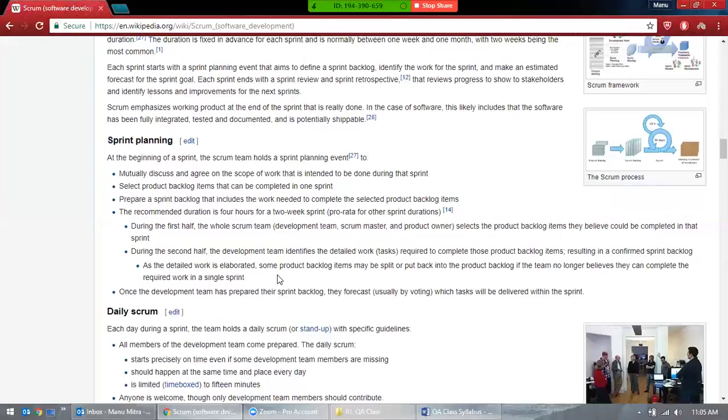But somebody else has to support him, some technical person or his manager, saying that no, we have a lot of Java work here. There are a lot of objects and classes, and we have to coordinate with another team. So we have to take this time. This time is important. Then the Scrum Master agrees and says, okay, good, we'll take this as 5. That means 5 days: 3 days for development and 2 days for testing.